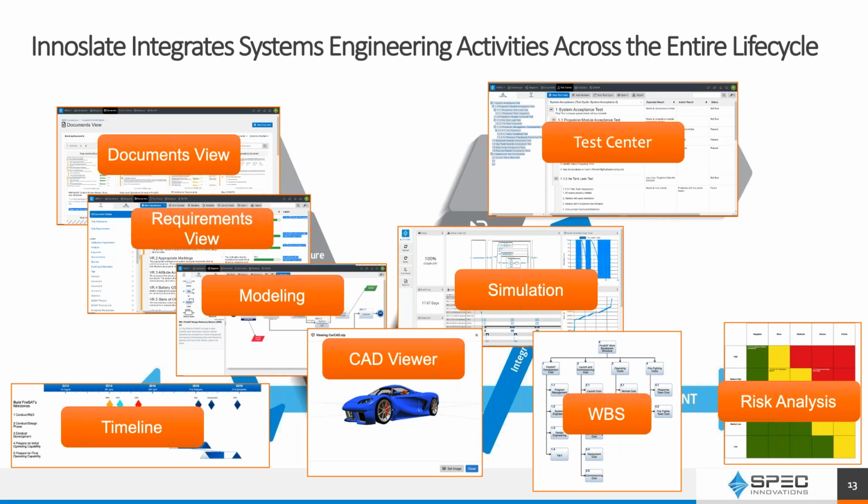And then we can also use hierarchy charts to break down the work breakdown structure. And again, these are actions that basically define what needs to be done as part of the building of the system, not only from the synthetic side, but also from the physical side. So there are going to be items like systems engineering, program management, operations, and cost schedules, that all need to be defined as part of the work breakdown structure and then assigned to those areas within your program to help deliver the information as part of that model.